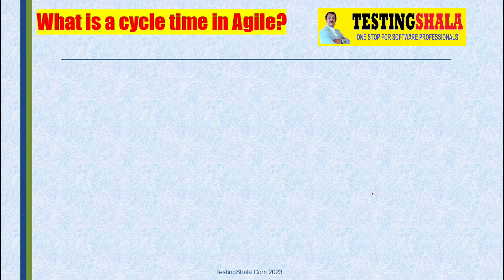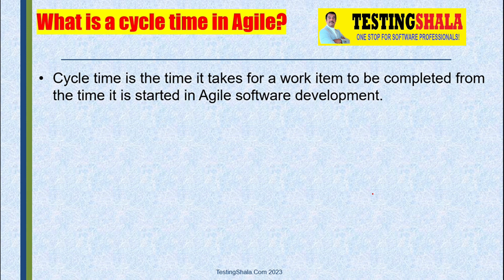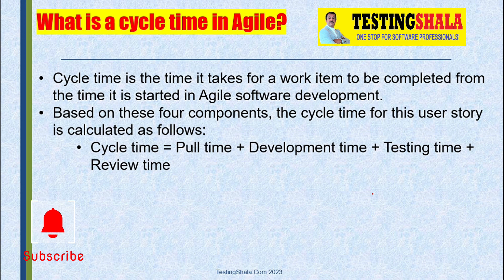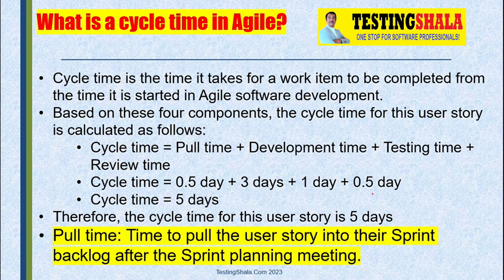What is cycle time in Agile? Cycle time is another measure used in Agile. It is the time it takes for a work item to be completed from the time it is started. We can think of it as flow time — the time to pull the user story from the sprint backlog after the sprint planning meeting, plus development time, testing time, and review time as part of the overall effort to complete that work item.